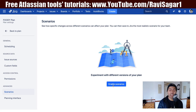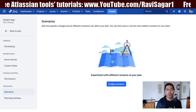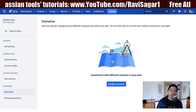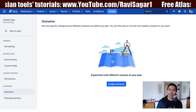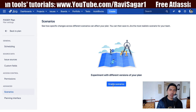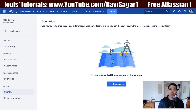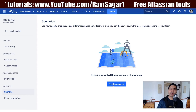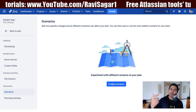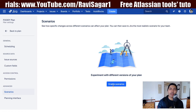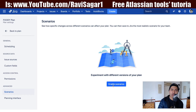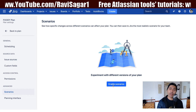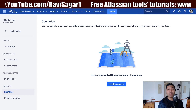There is also an option to enable scenarios. We talked about creating a plan and committing it to the project. When working on your portfolio plan, you can add a resource, change some dates, or experiment with the schedule. If you want to have two scenarios to compare later, you can enable it here. This gives you the option to switch between two different plans using scenarios, discuss the outcome of scenario one with stakeholders, and if you prefer scenario two, commit those changes to your project.